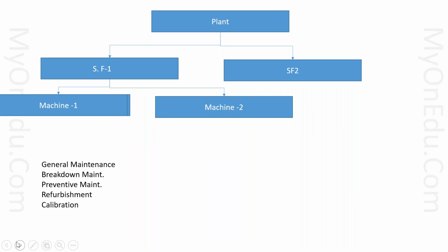Let's say you have 10 equipments on which you need to do routine maintenance. In that case, you can prepare a schedule of the activities to follow for each particular equipment. For that purpose, you need to create a maintenance order in plant maintenance, and the same maintenance order you can integrate with PS by assigning a WBS element to the maintenance order.